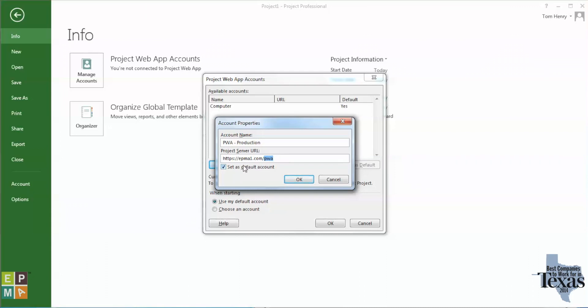What you want is everything up to PWA. Sometimes in the Project Server URLs it would be everything you see followed by '/PWA/default' — you don't want that 'default'. It could say '/PWA/ProjectCenter' — you don't want that either. You want everything up to and including PWA, and that's very important.